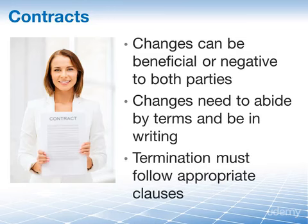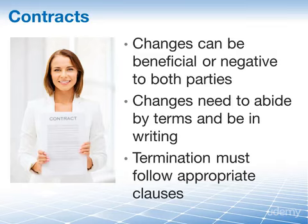The same is true when it comes to termination of the contract — you can only terminate by following the appropriate termination clause in the contract itself. By the way, have you noticed that I just made an intentional conceptual error? That statement is correct, but this is the wrong process to talk about termination. This is about controlling procurements, not about closing procurements — just testing if you're still following along. We will discuss termination when we get to the close procurements process lesson.